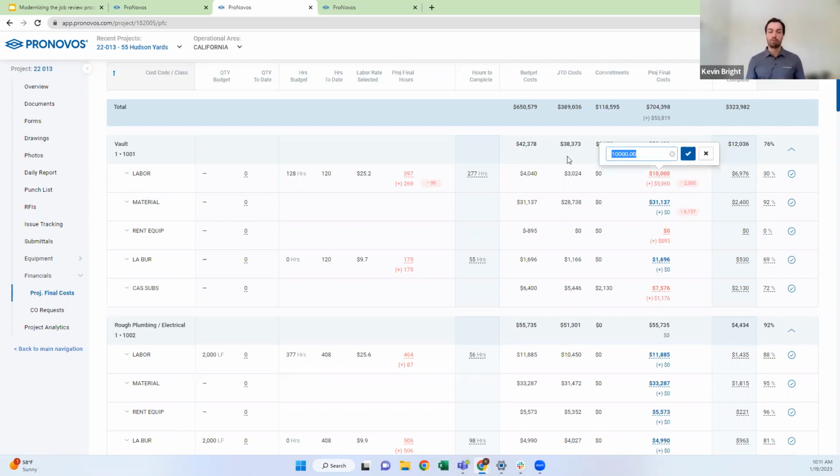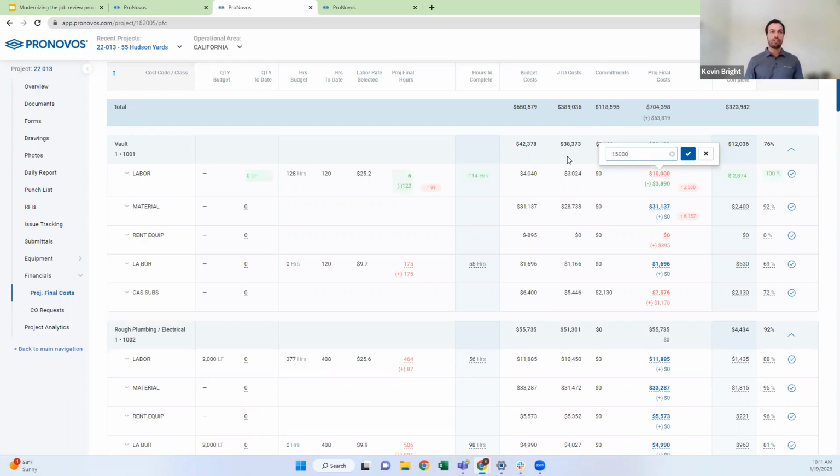So let's say my original projected final cost was $10,000. I say, you know what, I think that was light. I actually think I'm going to finish at 15,000. You can start to type it in and it's going to tell you what your adjustments are. Now I can see I'm going to finish $10,960 over budget. That means my cost to complete on this line item is $11,976. So as I make the adjustments in real time, I can see how that impacts all the different parameters of that line item.